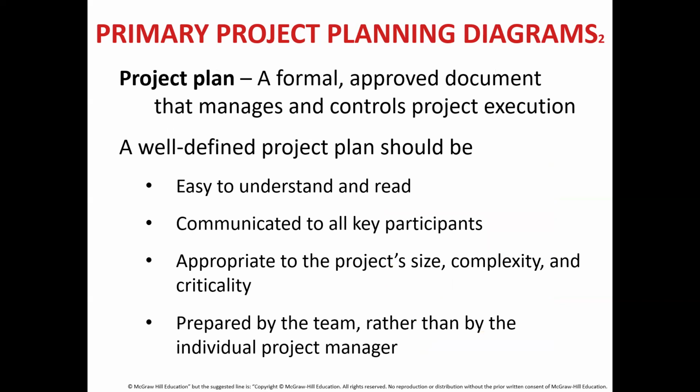A project plan should be prepared by the team rather than by the individual project manager. How would a project team feel if a project manager handed them a plan? Would they work hard to meet the deadlines? Probably not, because the timeframes required to finish the task were forced upon them. They did not participate in the initial estimates and do not feel any ownership of the project.